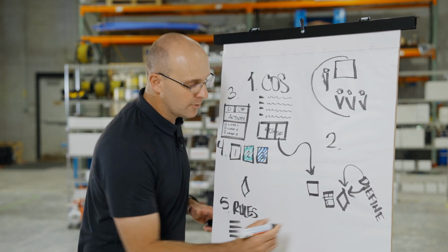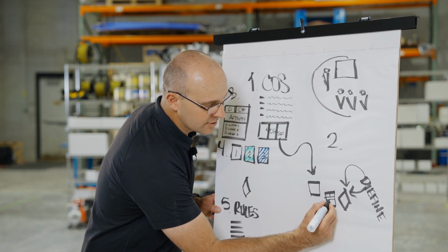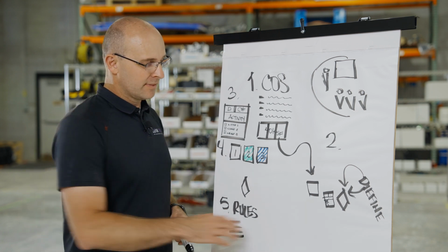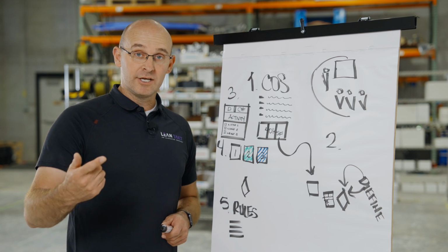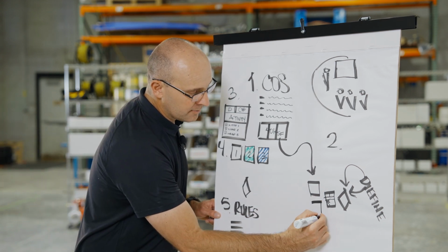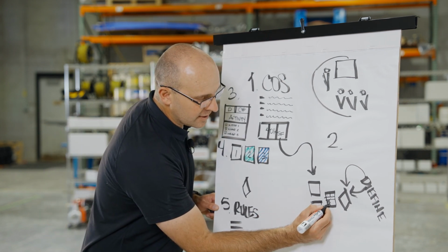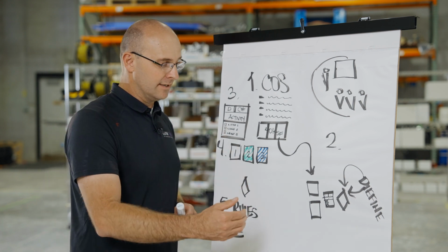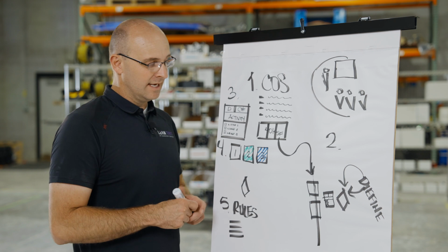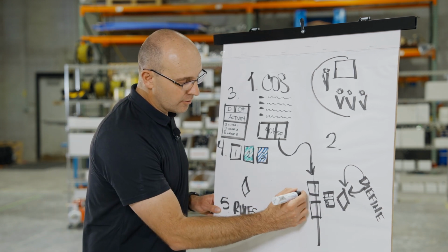And this is the most important part. Once this other sticky is in here that fulfills this need, you can check that need off and know that your sequence is complete. Then this first person will say, hey, need number 2, I need such and such. Then another trade partner will come up and put their sticky up that fulfills that need. And then the first person will cross off that second need. That person can now sit down, and now we go through this set of stickies and we start to populate it back so that all needs are met, right?